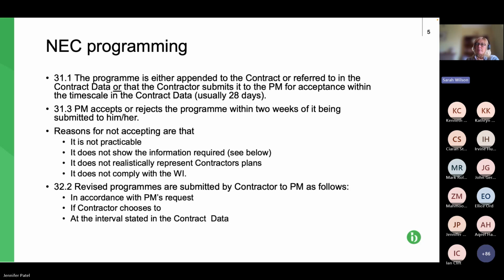So that's your base programme for the works. That is my preference for contractors and subcontractors in subcontracts, because you have your base programme sewn into the contract and it is there. There can't be issues about whether it is the base programme or not.